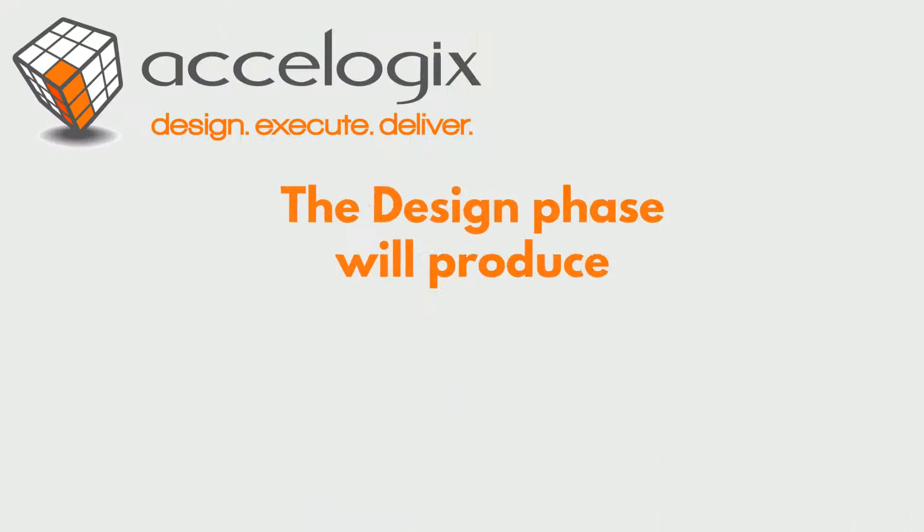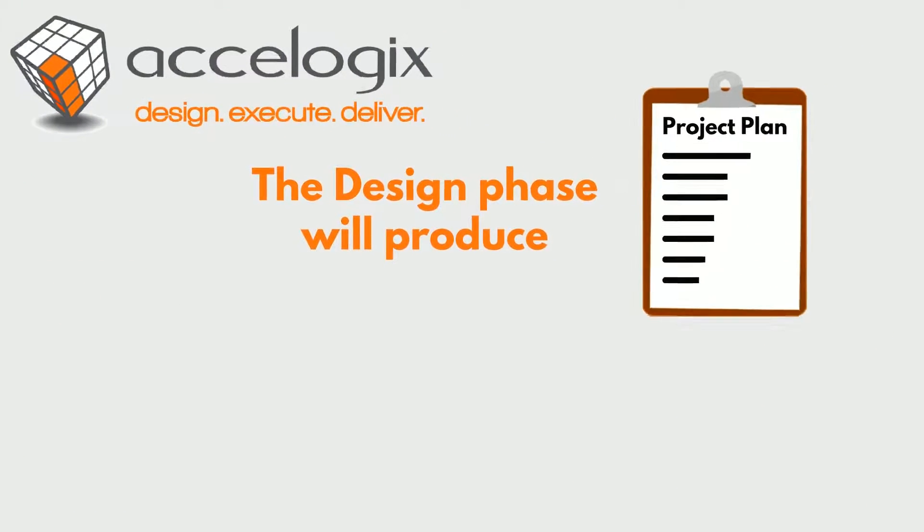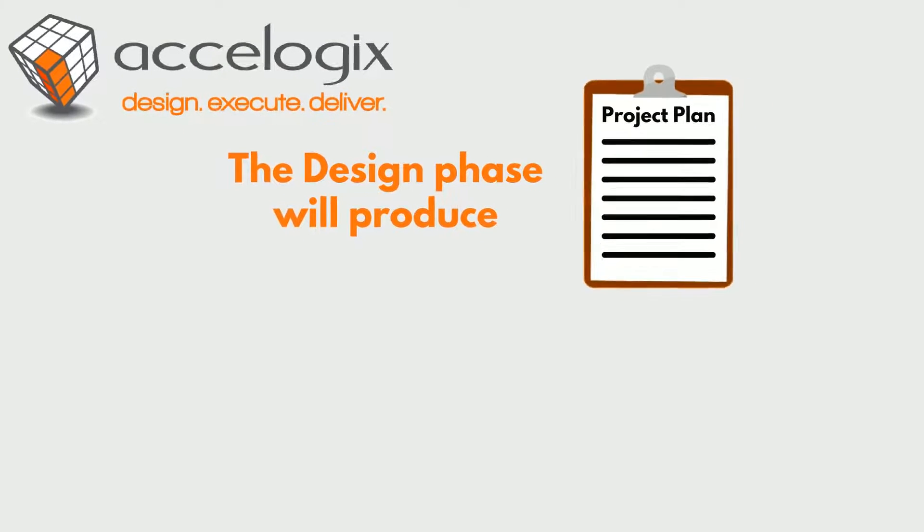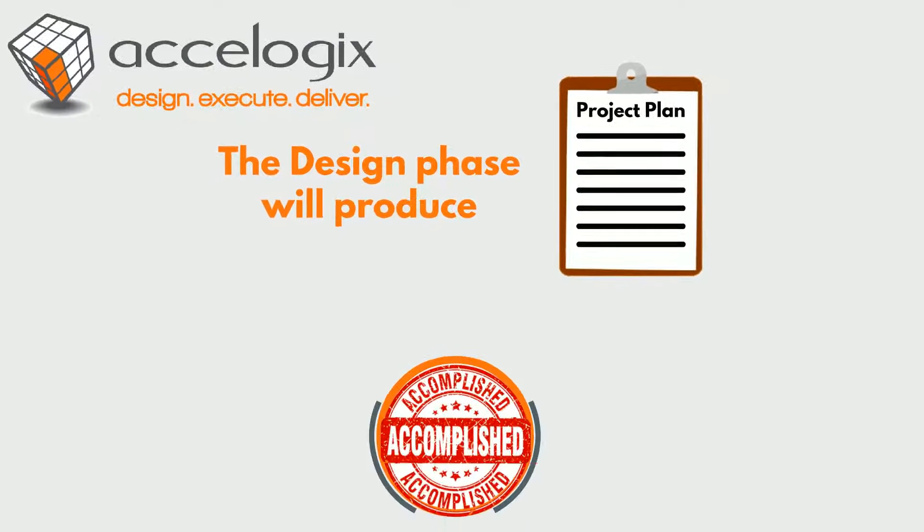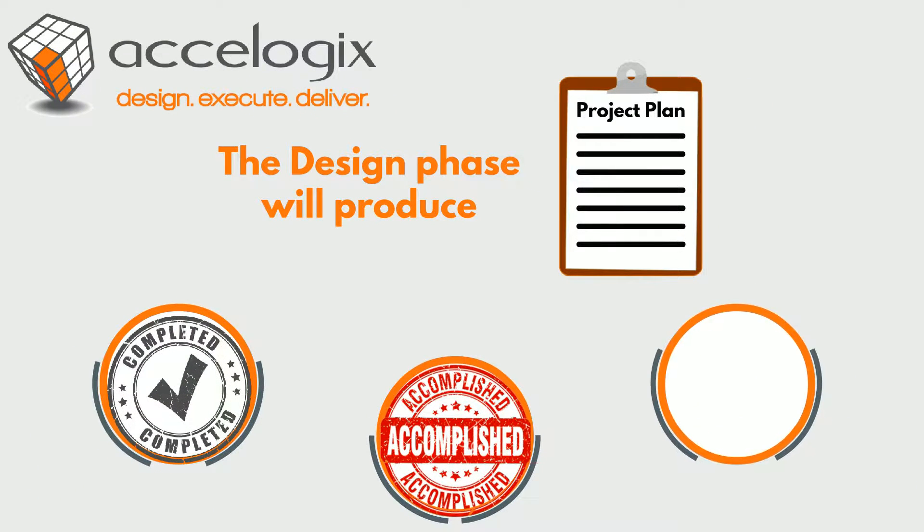The design phase will produce a detailed project plan that states what will be done, how it will be accomplished, when it will be completed, and what the known scope will cost you.